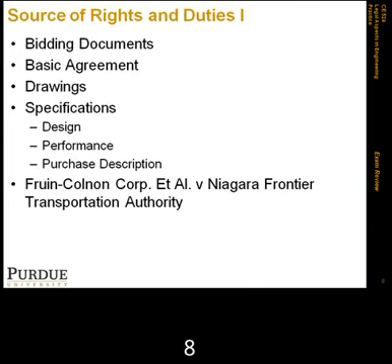Another important case was Blake Construction versus the United States, where Blake Construction was building a naval facility, and the drawings indicated overhead electric conduits. But there was a note stating that the contractor can relocate conduits in order to coordinate with other trades.